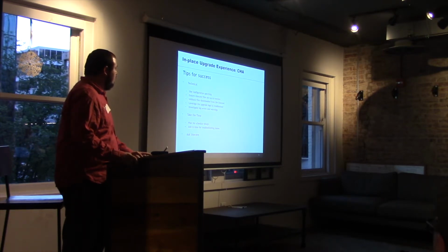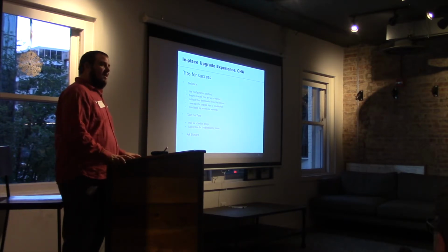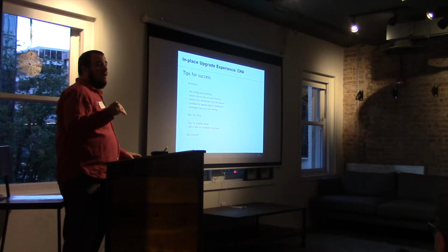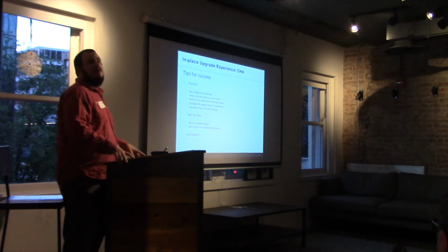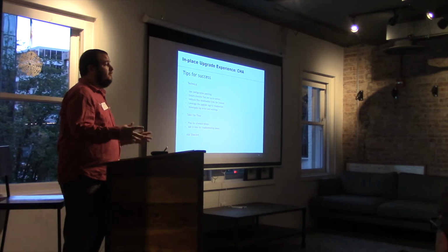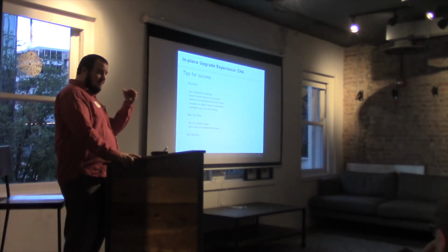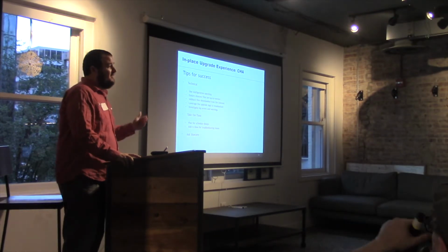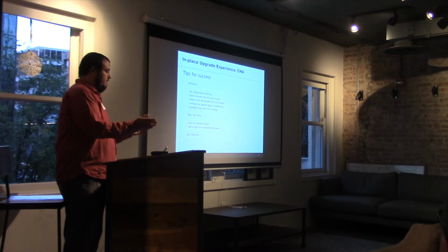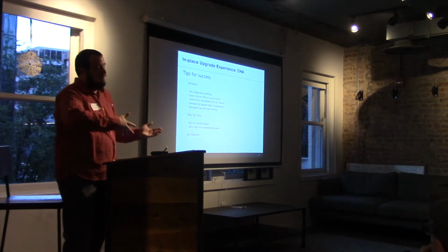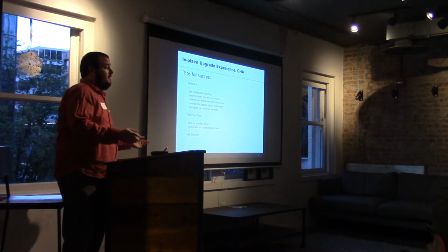Investigate log errors and warnings. Separate to the upgrade logs, after you do each upgrade, it's a good idea to check the logs after you've spun up the site and navigated to a couple of things in your site. Browse the Sitecore admin panel, maybe look at some reports. You really want to see, what is my instance doing? Did I really finish this upgrade? Or are there outstanding issues that we need to address before we move on to the next step? The last thing you want to do is do an upgrade, have issues, keep it moving, and then later on find out that you missed a step that was critical to the upgrade.